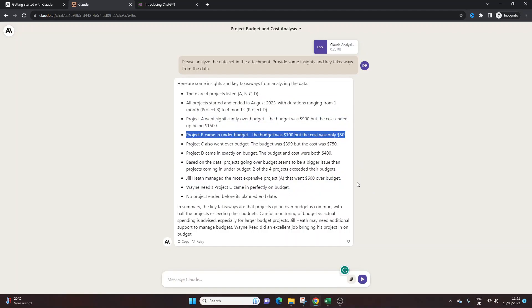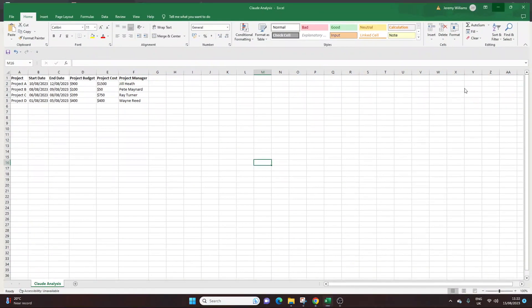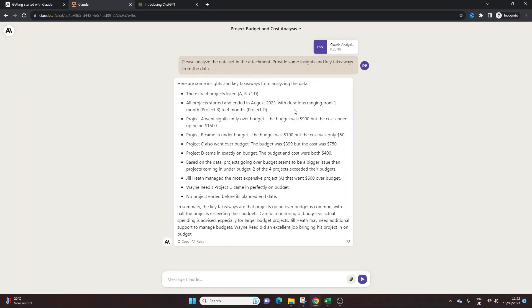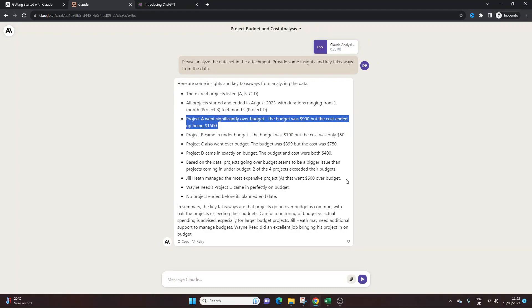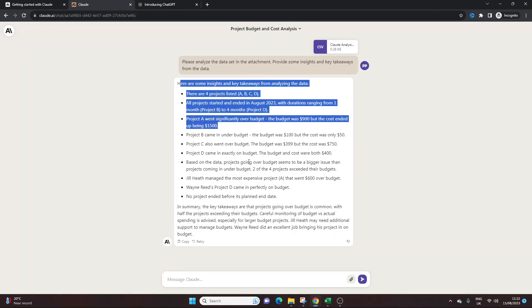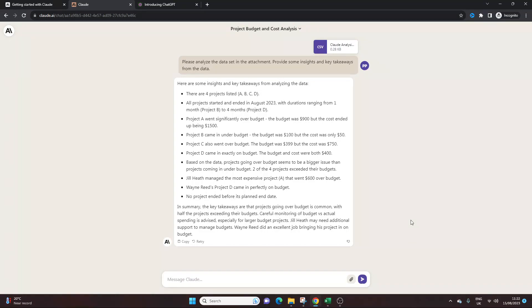Now some of it's very obvious. And for this particular data set, it's probably not necessary. But if you've got an extended list, you know, maybe you've got hundreds of records, this could be very valuable. So here we go. Project A went significantly over budget. The budget was $900 but the cost ended up being $1,500. So in summary, we've got a really nice summary of this file. So imagine if you've got PDFs or really extensive documentation and you don't want to have to sit through it, try and analyse it. You could just put it into Claude and you'll get these kind of insights, which is really cool.